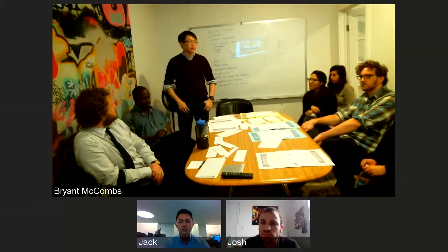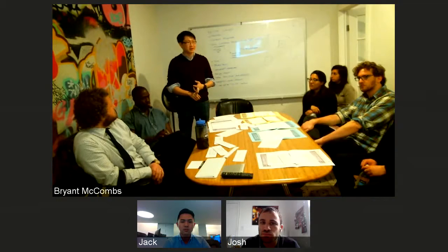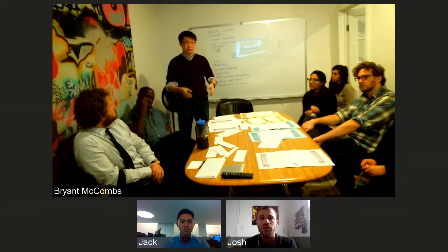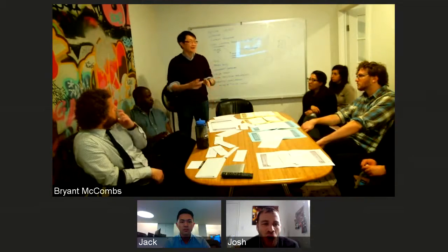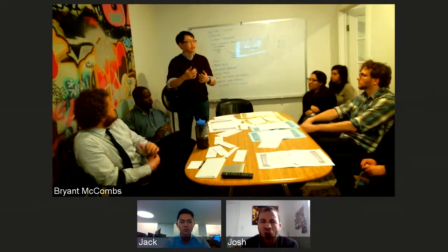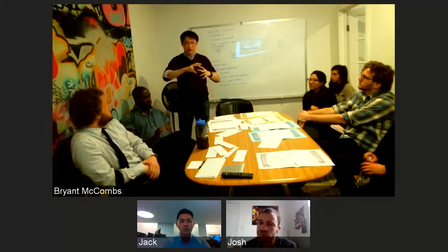That was usually QA was present in our estimates. So if they saw cards like that, they would also advocate for splitting them into smaller cards. If the 32-hour card can't be logically useful, that was another constraint on the cards.